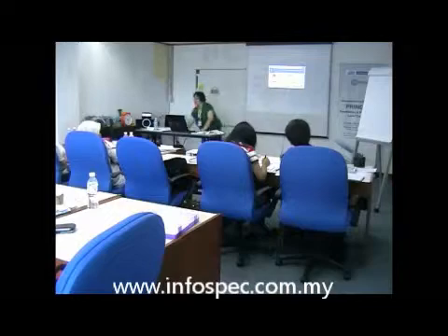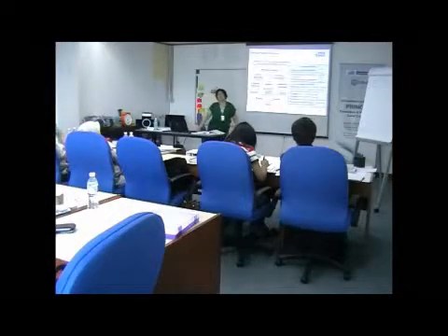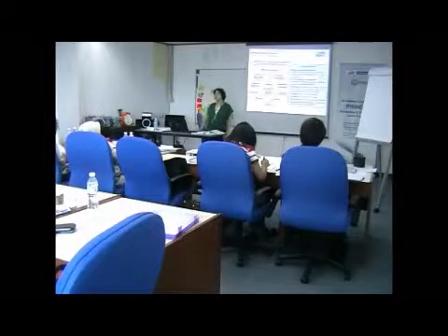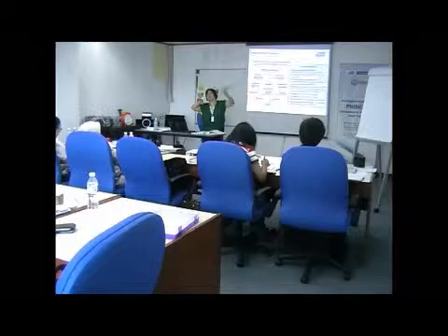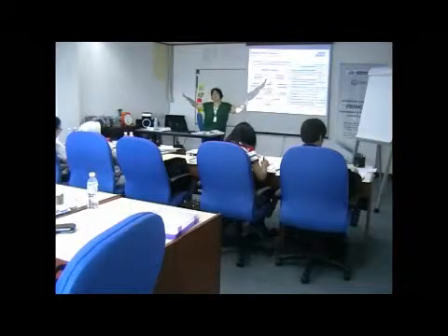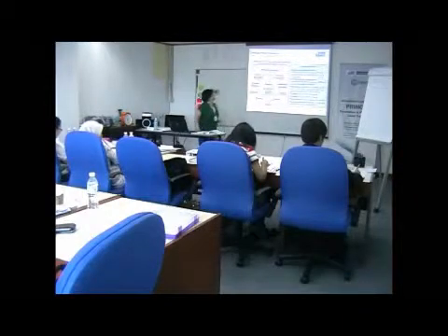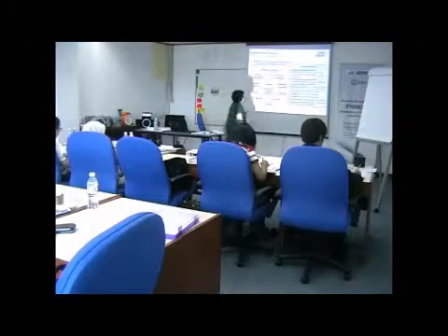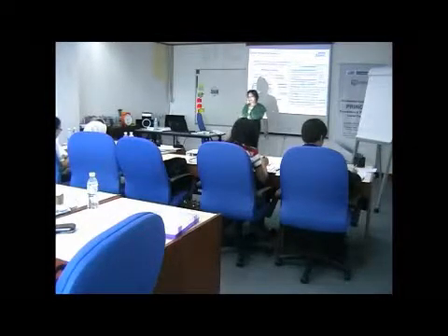So when we do the change theme here, it's a bit confusing because it has two different procedures. One is the change control procedure, and the other is your configuration management procedure. So there are two procedures you have to look into. Okay. So when we talk about configuration management, it is to identify, track, and protect your project products.